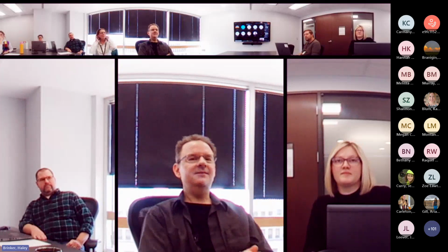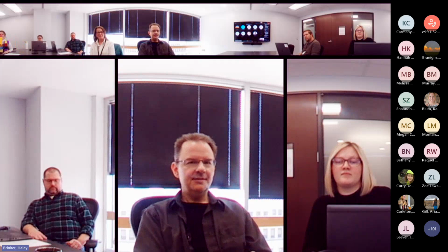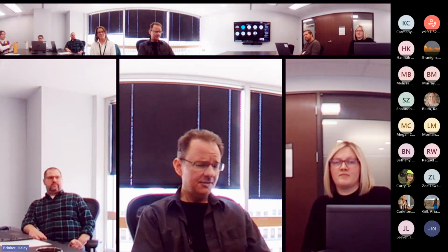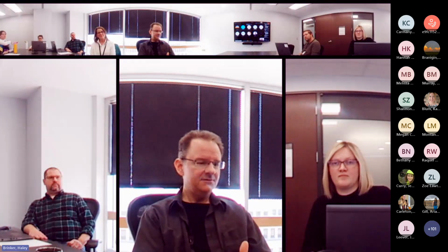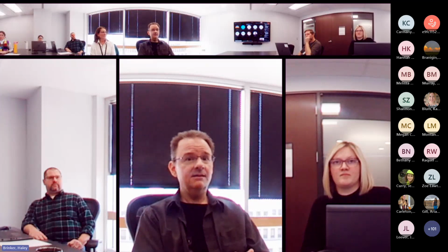And I know that people are concerned about our turnaround times, so I will throw out the fact that I did recently have reason to review them. Over the past 6 months, our turnaround times for archaeological phase 1As, for historic property short reports and full historic property reports, and for MPPAs, average within that 25 to 30 business day window that we've been citing.